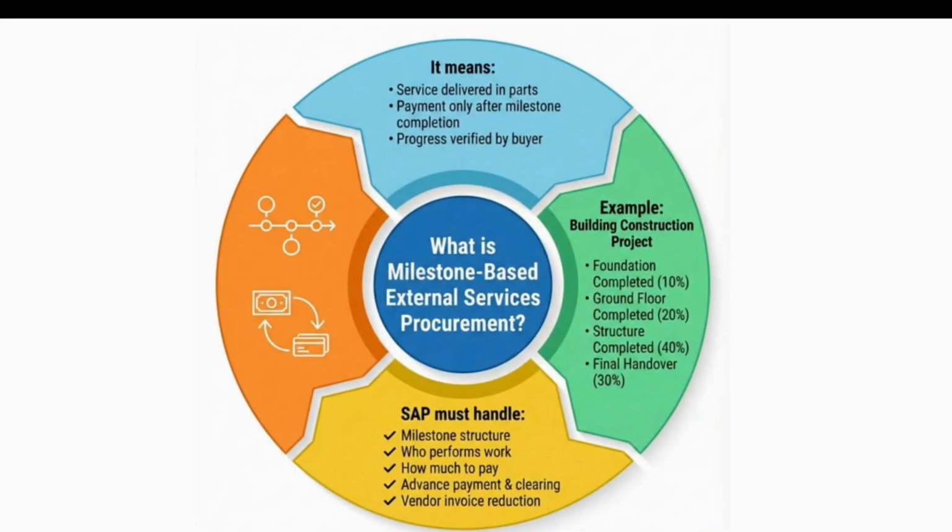So what is milestone based external services procurement? We'll understand the concept first. It means the service is delivered in parts. Payment is released only after each milestone is completed. The progress is verified by the buying company.